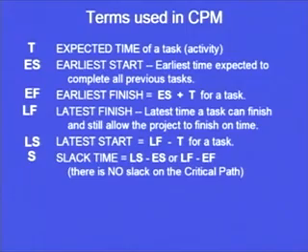So, no slack means that if anything gets shifted on the critical path, any activity is delayed, the overall project duration will be delayed. But maybe on certain other paths there is certain slack available, that the activities can be shifted forward and backward, so that we are able to release the resources from those activities for the activities on the critical path. So, network evaluation steps.